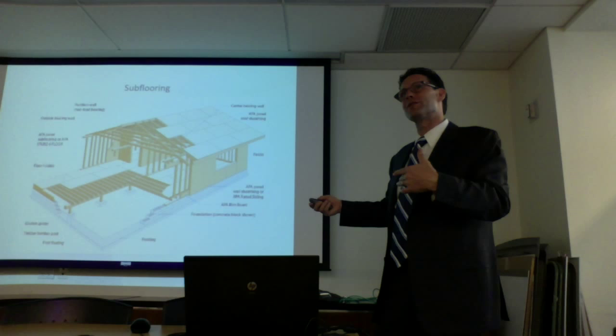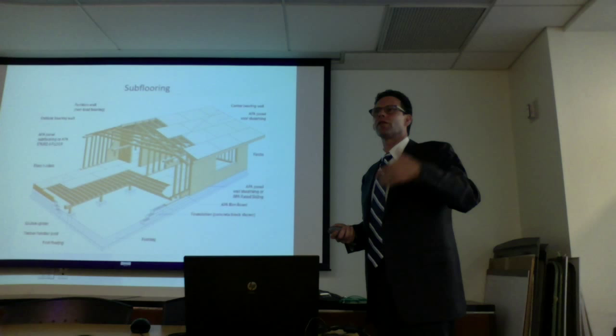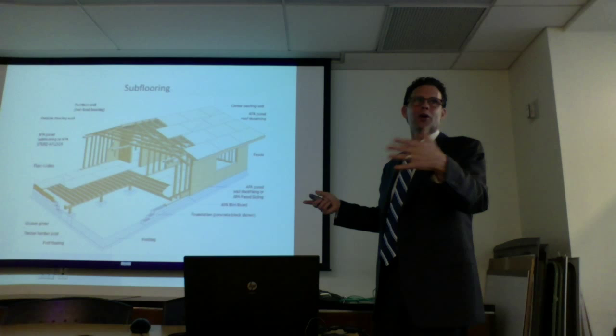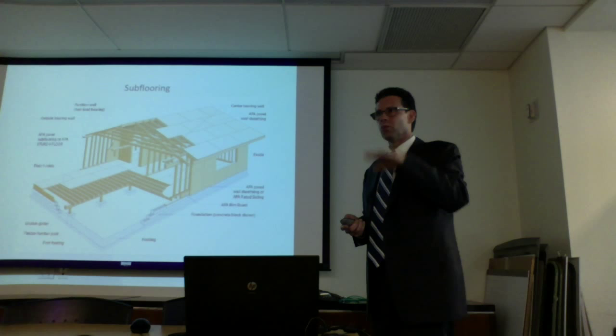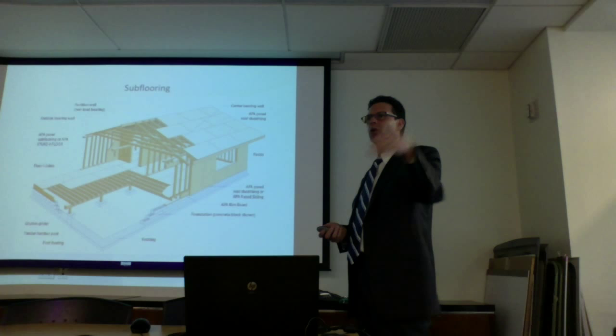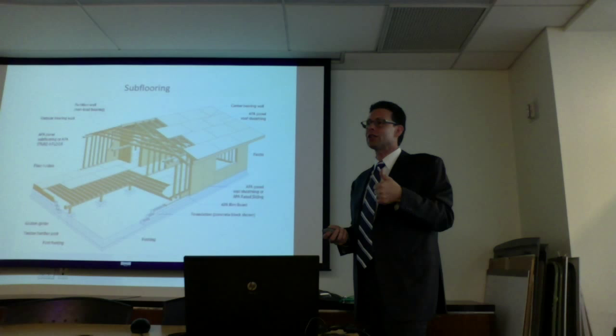So when I go into a bedroom, whether it's a 10 by 12 or 14 by 16, I can only do a certain section at a time, and I can only do one wall or so at a time. It's around $8,000 to $10,000 to replace a subfloor underneath walls and the main subfloor. I write it in Xactimate, and you'll see it. I have an example estimate, and I'll post it if it's not already posted. I have a scope for it. It's the materials that we use, and this is work that we do. It's not a guess. It's what it costs.